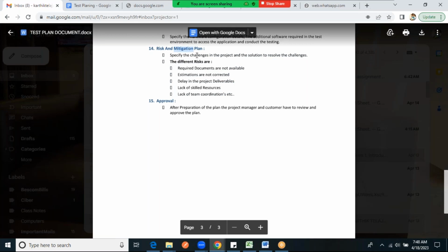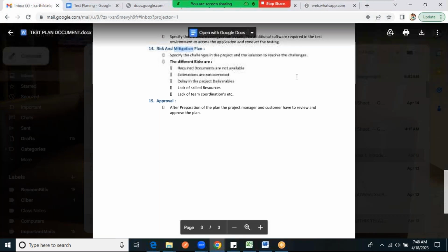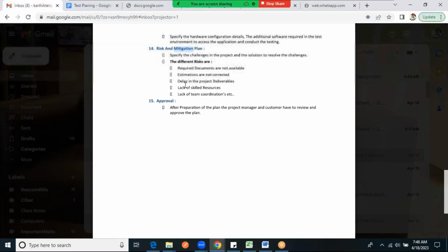Once they complete their development activities, I requested development, at least 2 developers, to support the testing team only for this specific cycle, as all the testing resources went on leave. That is one proposal. Or we hire some shadow resources from other projects just to support this cycle in the absence of our own resources.